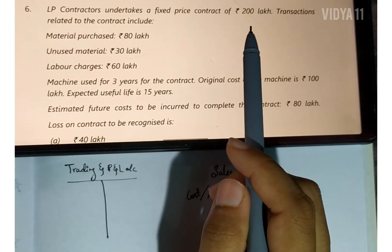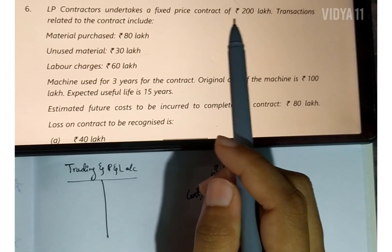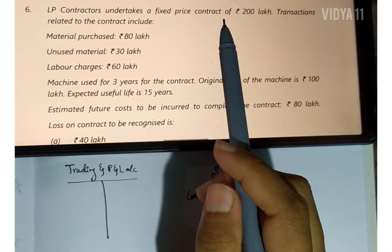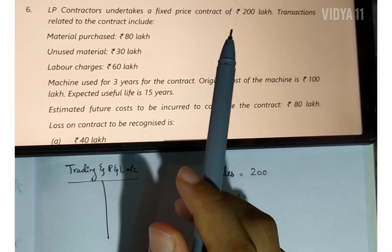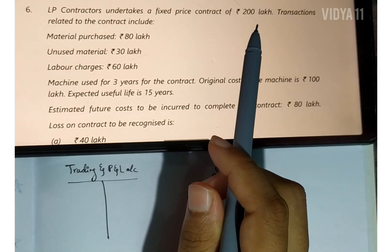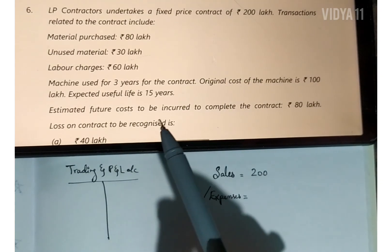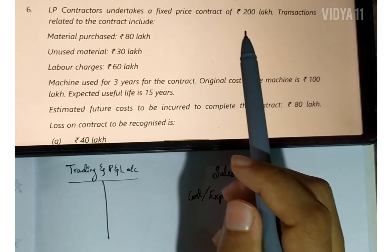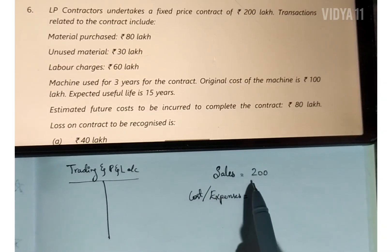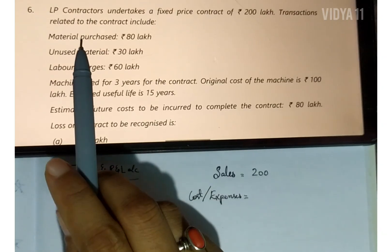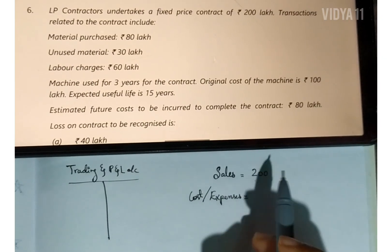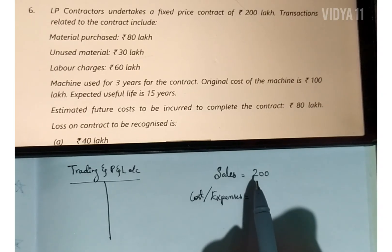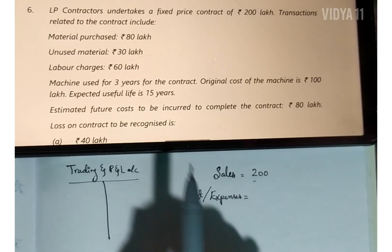This is a fixed price contract of 200 lakh. Whatever variation may happen in material cost or labor charges, we are going to get only 200 lakh as the sales value for providing the construction service. After completing the contract, we get 200 lakh — there is no change in it.